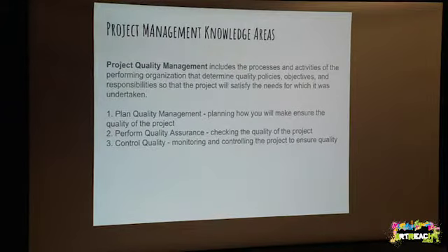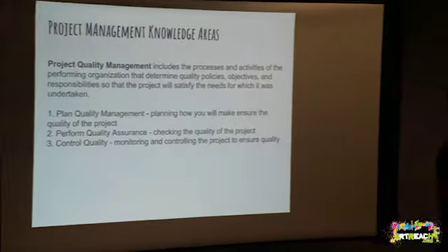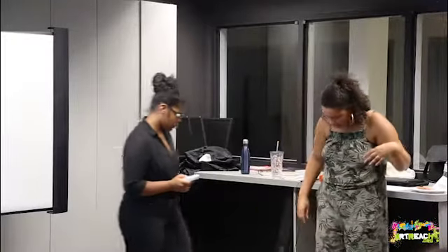And something for estimating budget, an example of that is, let's say you're doing an arts project and it involves cameras. You're not just going to put a number in your project budget. You might want to get 3 different quotes from 3 different places and shop around. In larger corporate projects, they do that through procurement, and they shop around and find the best bang for their buck, and that's what we should be doing in the community as well. That's what project estimating comes at. So you actually create an estimate budget, and then you can create a real budget. Is that what you get?